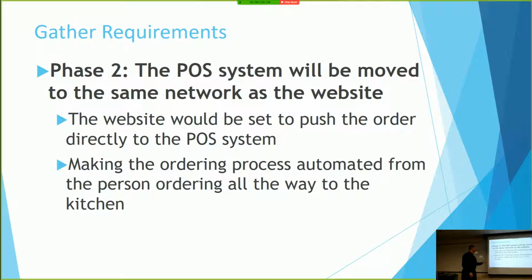Then the second phase would be that the website would be directly pushed to the point of sale system, which would make the ordering process complete from one end to the other. Now, in order to do that, their current point of sale system is standalone, so all the equipment that goes into that has to be brought into the current network. This is actually what stopped the entire project, and they didn't go any further because they were not able to move that system into our network for a lot of various reasons.